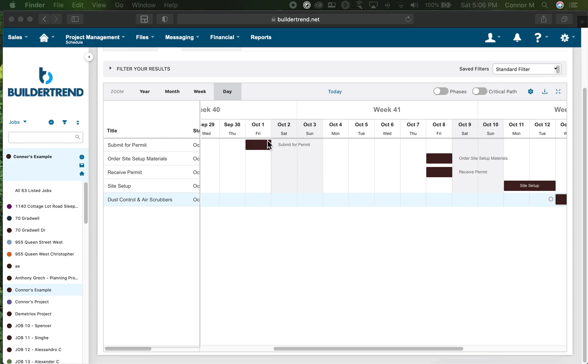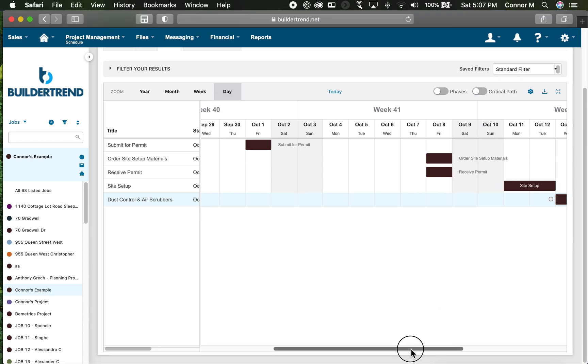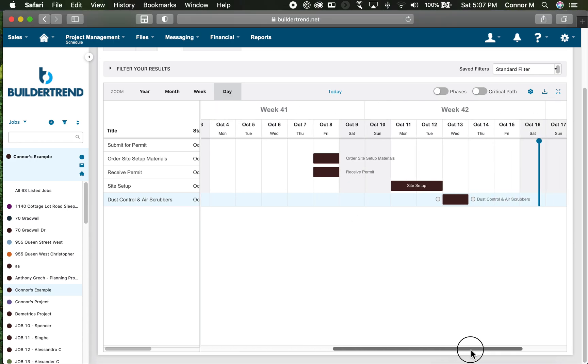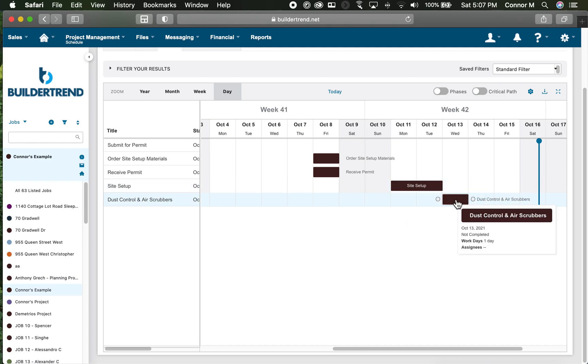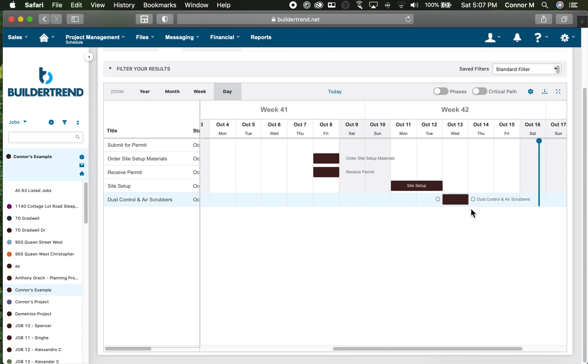Just a few activities I've got: submit for permit, order my on-site setup materials, receive my permit, then two days of site setup, then proceed with dust control and air scrubbers. I've stopped here, but you'd certainly have a much larger project folding out for what you're building.